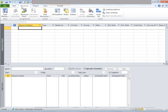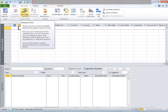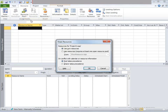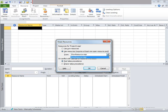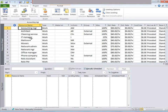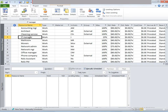I'm going to go to the Resource tab, and under Assignments, there's something called Resource Pool. I'm going to click on that dropdown. Once I do that, click on Share Resources. Another window would open. Go ahead and click on Use Resources — it requires at least one open resource file. Ensure that the file from which you would like to import the resources is open. Then under From, click on the dropdown and select the file. I'm going to click OK now.